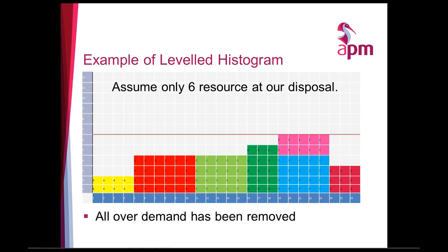Another way of saying this regarding the competencies of an individual, let's say I've got 4 different types of designers, each one a different grade level, you can say, well, I've got 4 separate types of resources. They're all designers, but the competence of the individuals actually does differ. So you could have a histogram purely showing your grade 1 designers, for instance, your grade 2 designers, so then you could come down to a lower level of fidelity around what type of resources you require.